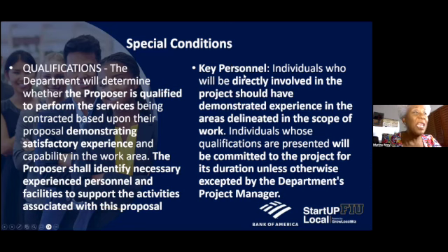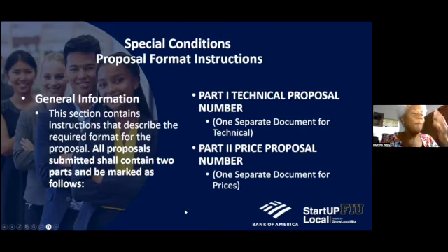And if you have to change key personnel, you have to send all the criteria on that person, all their background, schooling, experience, and what have you, until you get that okay in writing from the government that says, yes, you can replace George with Barbara. That's going to be your defense on the contract, because contract compliance and management is the key. And I'm going to touch on that at the end.